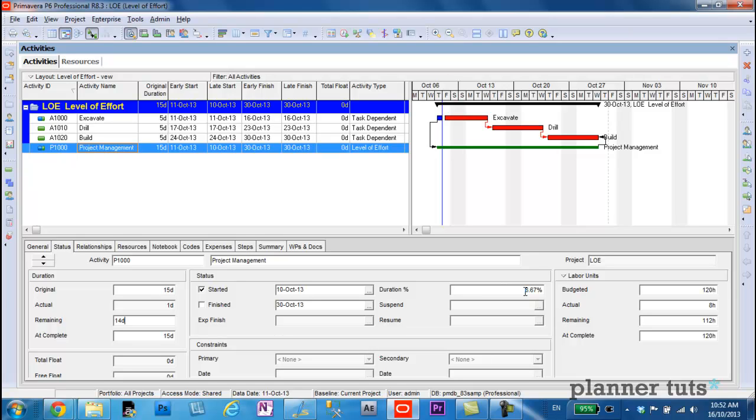It now has a duration percent complete of 6.67%. So that's basically one day out of the 15 days. Okay, so that calculates to 6.67%. So in this simple example, it's pretty straightforward to calculate a percent complete using duration percent complete, as well as to status and automatically get your actual information to trickle down to your level of effort activity.